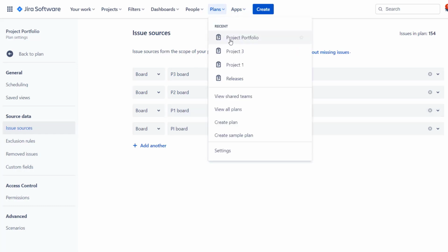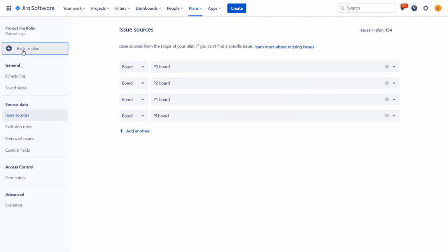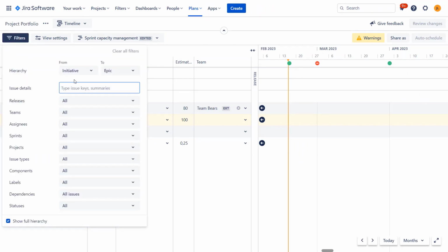You can put some kind of prefix here to indicate which level each plan is. And using this filtering that I've just shown, you can also display different levels of information, because probably on portfolio level you do not want to see subtasks, maybe even tasks, you're interested in initiatives and epics, while on the project level you'll do another filter and you'll display only epics and lower, right?